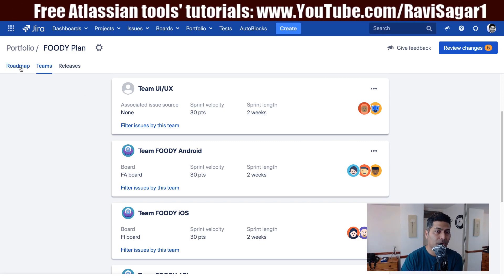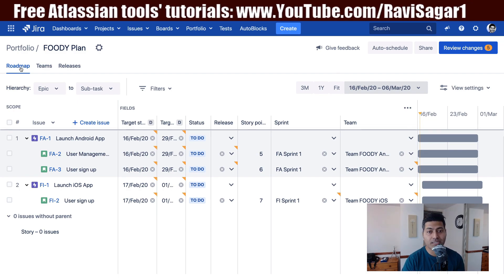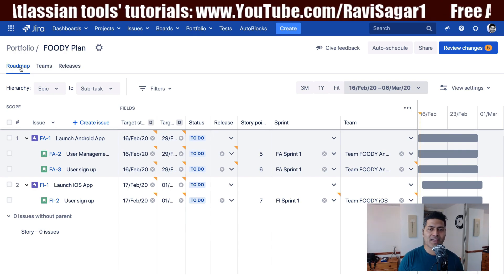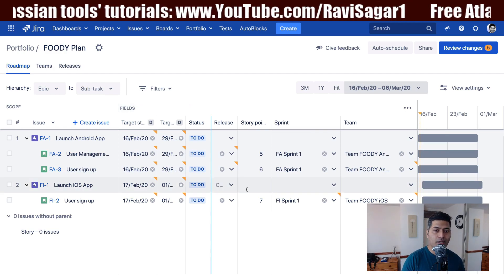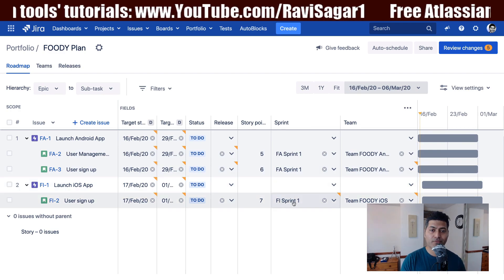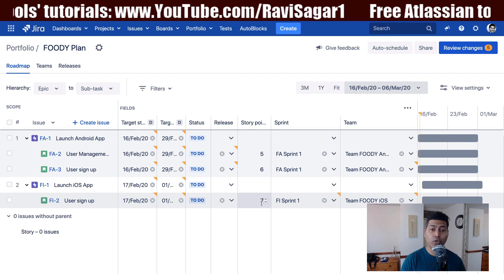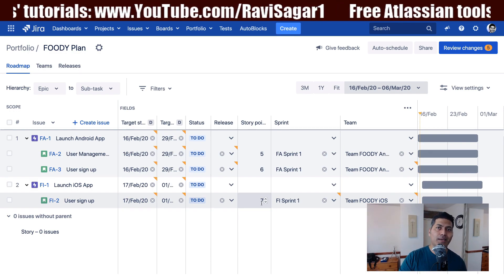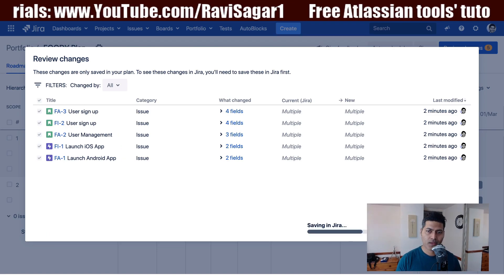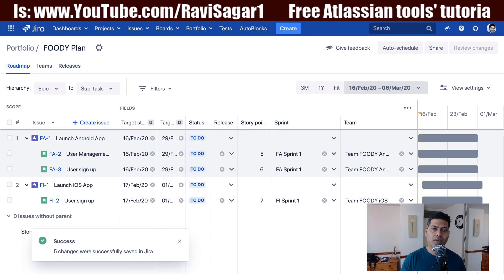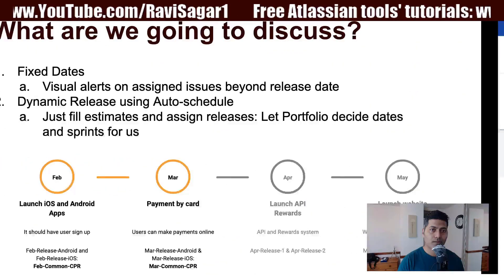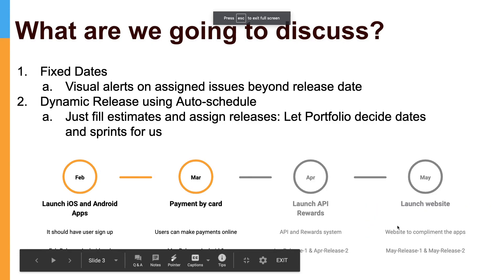When you assign teams to your stories, you have the concept of team velocity. Right now, if your team velocity is 30 — which is just a suggestion — maybe in your next sprint you realize you're not really able to achieve 30 story points, maybe only 25. You can plan accordingly or take help from Portfolio. Right now we can see we are not doing a lot of work for Sprint 1 — for the iOS project we are trying to achieve 11 story points, and for Sprint 1 we are trying to achieve 7 story points. We are not really pushing the capacity of the teams, but when we start working on the sprints we will have more clarity on the team's capacity.